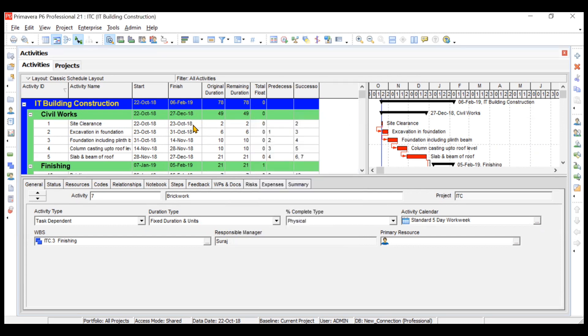Your project might run six days a week for 10 hours, or five days a week for 10 hours, or seven days a week for eight hours. You have to create your own calendar with respect to your project and assign it to activities. It's also possible that different activities will have different calendars — for example, concreting may have a different calendar because the concreting gang or equipment is not available like shuttering.